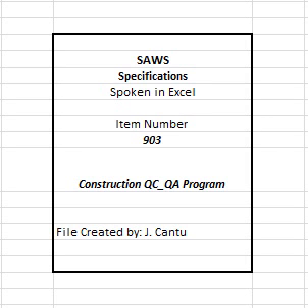The phases are as follows and are further detailed in the appendix. 4. Pre-construction phase, those actions done in advance of construction: advance planning, shop drawings, layout schedules, detailed sketches, test reports, mix designs, schedule of values, payment schedule for non-unit cost contracts, contractor's safety and health program, and physical checks of materials on site comparing to approved submittals and contract requirements.